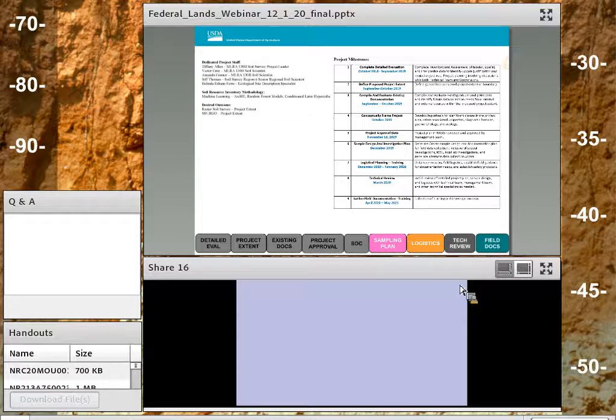So then we get into listing out the dedicated project staff, and let's not confuse this with saying dedicated project staff and project staff that we hope we can get. In this, we want to make sure that we're listing all the dedicated project staff that are already assigned to this project. And that should include your regional soil scientist, soil data quality specialist, if there's an ecological site description specialist, all the soil scientists who are actually going to be working on the project.